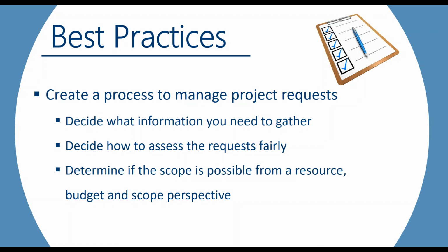You can do that by also figuring out what your organization's goals are, and deciding how to compare one request to another fairly using goals, critical success factors, and KPIs. You also need to figure out if the scope is even possible from a resource, budget, and scope perspective. So how much realistically can the organization take on?